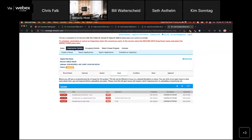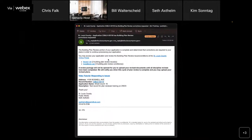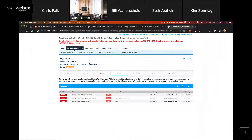What you're going to notice here is that the status is in review still, meaning that there are other reviews still in progress. So if you get one of these email notifications and you click the link and you come into the digital plan room and you see some issues published here, you also notice that the status of the overall review is still in review. That means we're waiting for the final other reviews to complete prior to the cycle being completed. So that's an indication that it's not yet in a state where I can start my uploads, but I can start reviewing those comments until a point in the future that occurs.